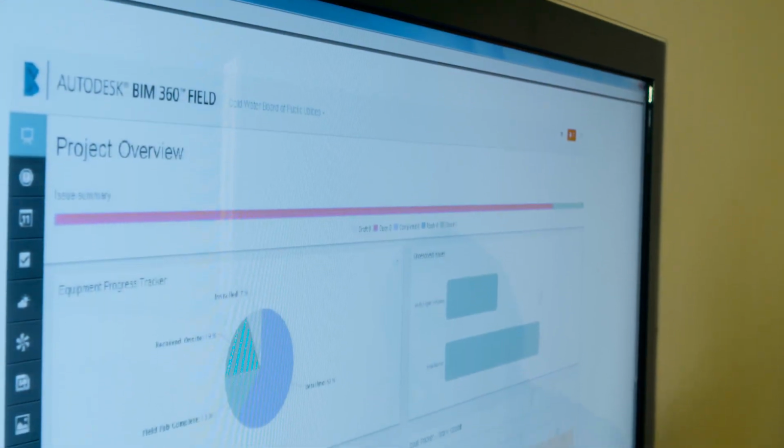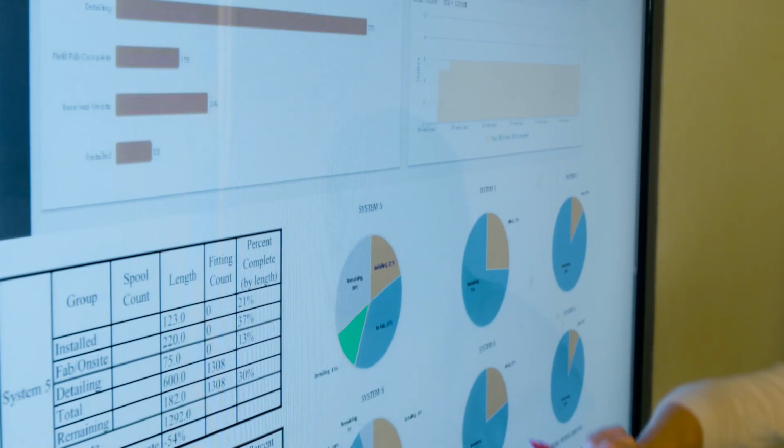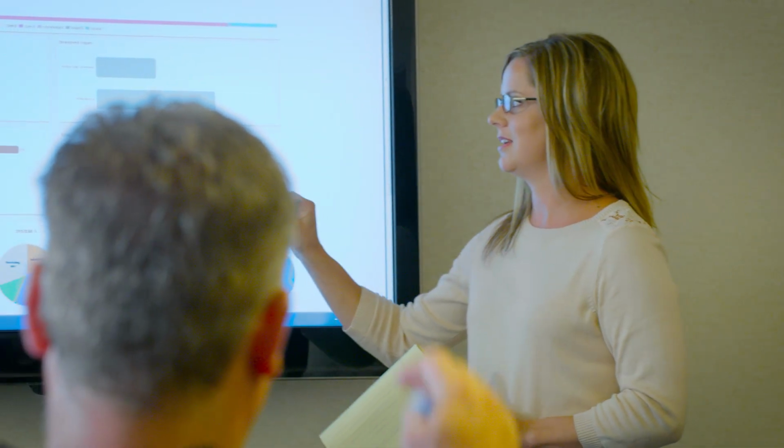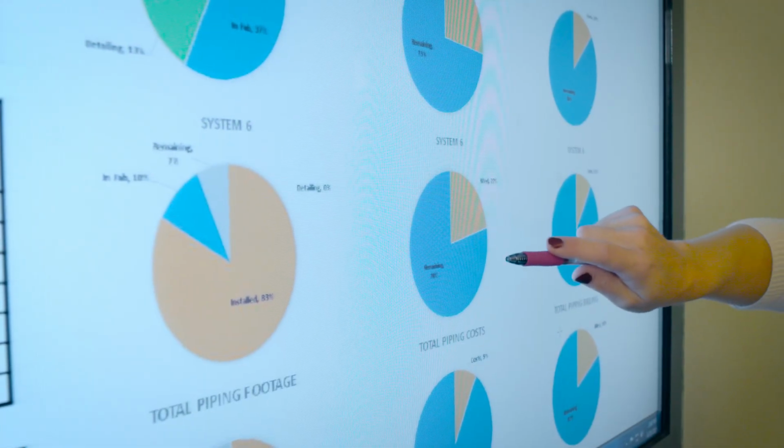Managing change orders with BIM 360 Field becomes easier because we now have real-time documentation that we can show transparently to the customer. Fabrication is pre-planning. When we pre-plan, we build these components early on in a project, so it's understandable that if we stop a process halfway through, there is a cost impact. This is the documentation to back it up. If we don't track these things and really monitor every single piece and component very carefully, we don't find those issues until the end of the project.